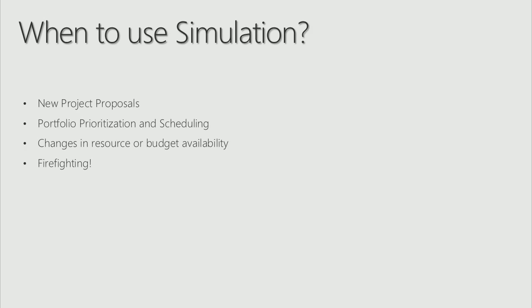Definitely, anytime we have changes in resource or budget availability, excellent time to use simulation. Anyone had their budgets cut? Ever? Yeah. But then are you expected to be able to do the same amount of work, or can you quantify what that decrease in budget or resources is going to do to your timelines? Can you go back and say, well, if I got 20% less people to do it, then these are the new dates you can expect? Simulation makes that kind of forecasting very, very easy.